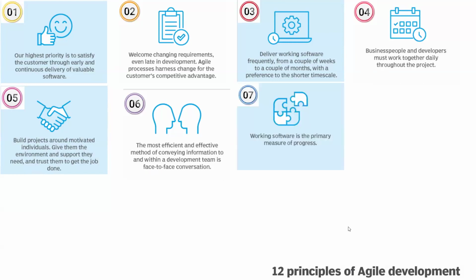principles for time being. Working software is the primary measure of progress, or working product is the primary measure of progress. In Agile, when you're managing a project in Agile, how are you going to track the progress? It's either 0% or 100%. In a predictive project, I can report in this particular area, I am 30% complete in this month. Next month, I'll report 40% complete. And it will go on, then 80, then 90, then 100.